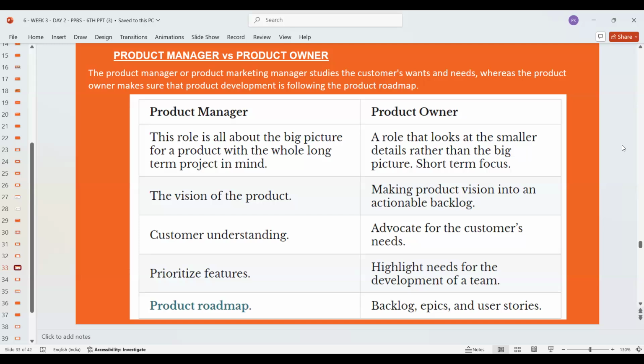Whereas with product owner, we are concentrating on the overall execution, but that is broken into small chunks of each sprint, right? Maybe 2 week sprints, 4 week sprints, and in each sprint we are focusing on the overall completion. So our focus is definitely on completion of the project, but we are working at a sprint level. Everybody with me? So completion is at project level, that can be 6 months, 1 year, whatever the length and duration of the project, but our execution is on sprint level.